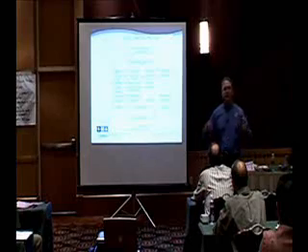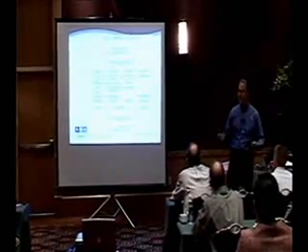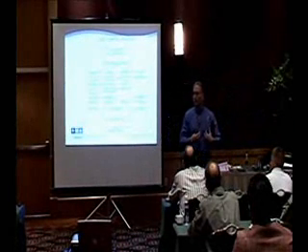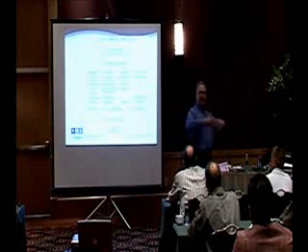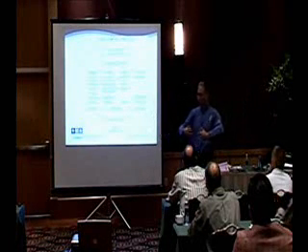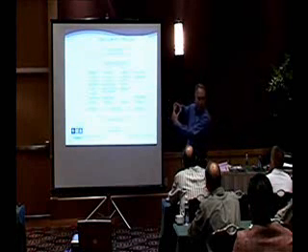That's the way it was. Every place that we built, and we built in multiple locations, was never even in a subdivision environment of our own. We might have built multiple houses in a subdivision, but it wasn't our community. These guys knew that they were traveling. So what did we build into ours? We built in standard zone charges. If you build within this territory on a map, it was this price.